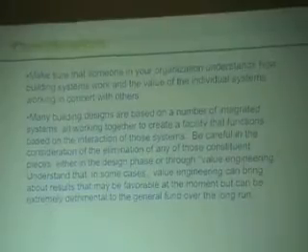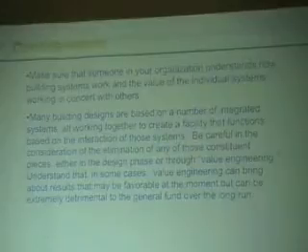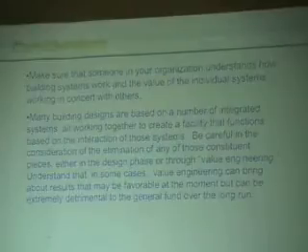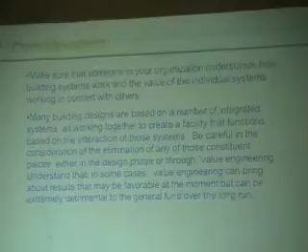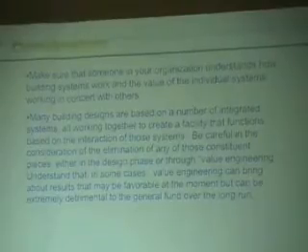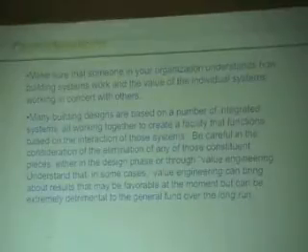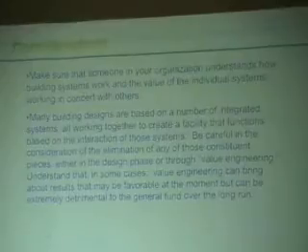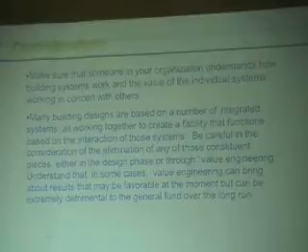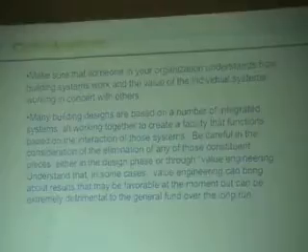Three-quarters of the way into the construction, I was invited to a construction meeting for some reason, and they had the plans out, and we were on the electrical page, and I noticed all these fluorescent lights with X's on them, and that means those are running 24/7. And I said, what are these for? I thought we wanted a dark building. Well, it is dark except for those. So one of the things you just have to nail and hammer, I guess, over and over again is what you want, because a lot of times they hear what you want, but they give it to you through their grid, what that means to them.